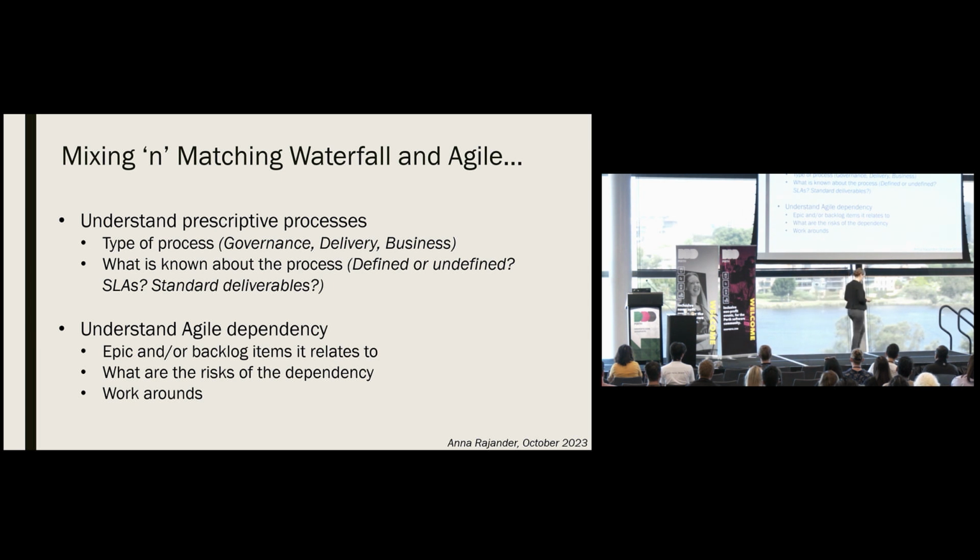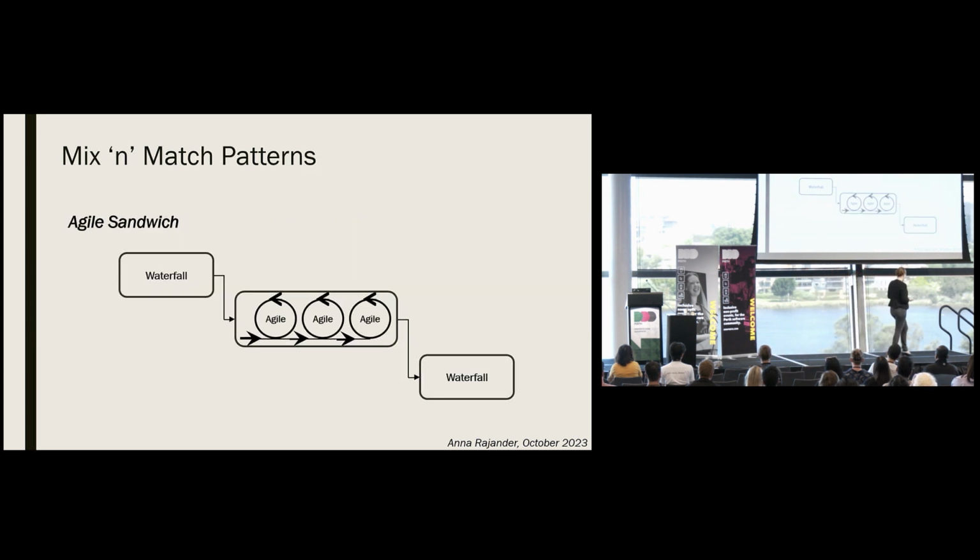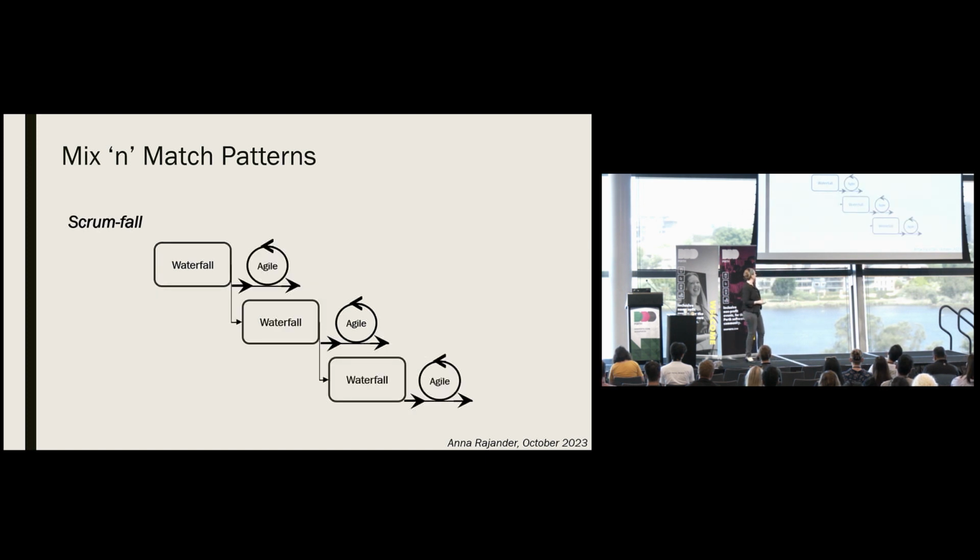For example, maybe something like an Agile sandwich, where a burst of Agile activity is sandwiched between waterfall processes. You could see this approach working, perhaps, for an initiative that requires some sort of approval to get started, but also approval to get fully implemented, something I've seen a few times in health for systems that will be used to facilitate patient care.